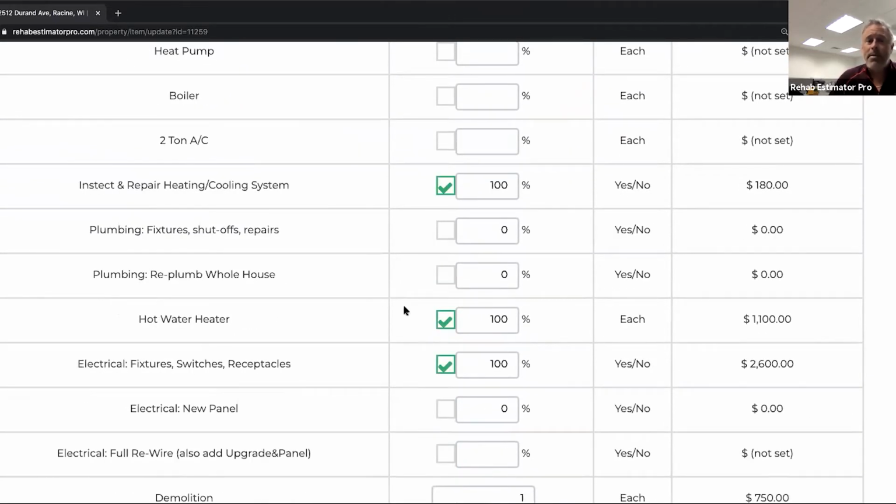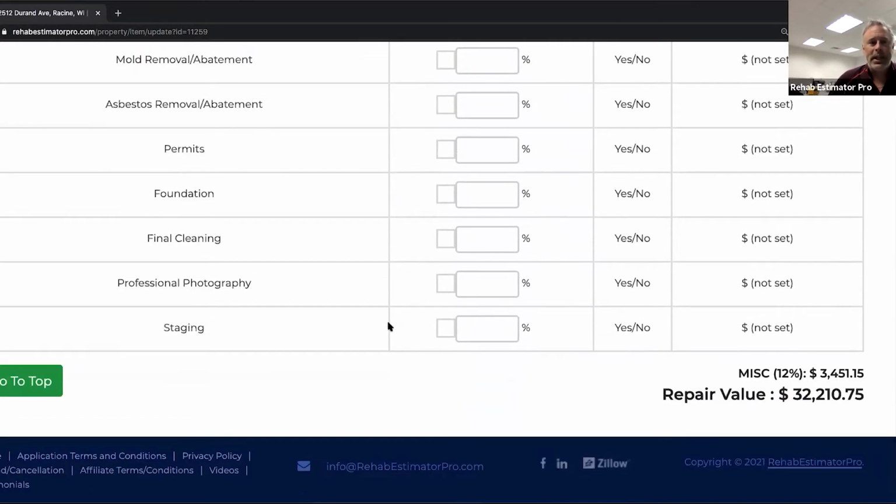And once you get a project, that project manager is going to take care of a full list of responsibilities and duties. They're sending out the prints or a scope of work and saying, hey, you're asking for numbers, and you're receiving the contracts back, and assigning the contracts, awarding them. You're looking at materials. They're gathering material lists, ordering the materials, and handling all the vendor relationships to get those materials there, or working through your GC to get them. They're handling the job site, the punch list, the scheduling. That just takes all of those hats away from you, but that person gets paid.